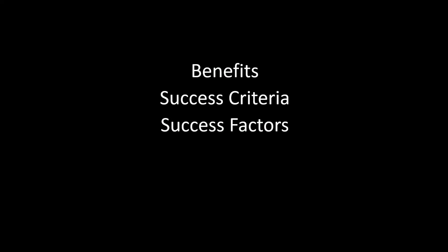Success factors are different from criteria. Criteria is the goal to reach. The factors are the things that will help you get there or prevent you. So retaining your top transmission mechanic is not a project success criteria, but it certainly could be a factor in you being successful. If you lose those skills, you may not be able to achieve the goals. The factors can also be around the support from the organisation, decision-making capabilities, clear communication channels. Every project will have its own success criteria and its own success factors.